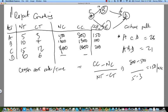So the way in which we'll crash, we'll crash in order of cost. So activity B, can we crash B? Yes, we can, but guess what? B is not on a critical path. The critical path is here. So to reduce, the only time you would make sense crashing B is if both paths have now become critical. So there's about five days slack between those. So we have to crash either A or C.